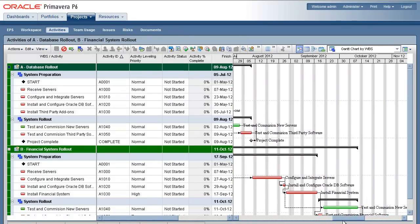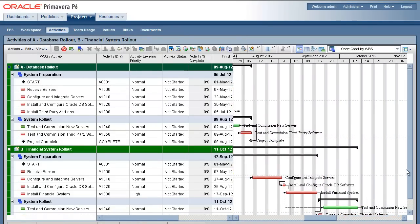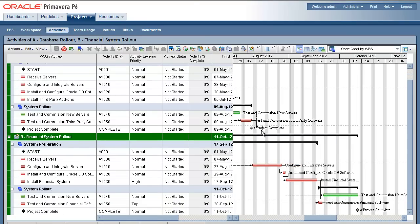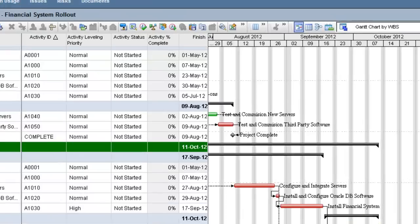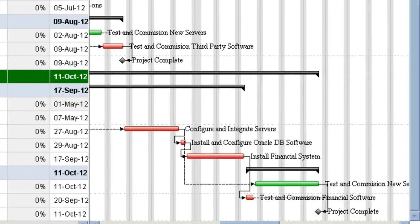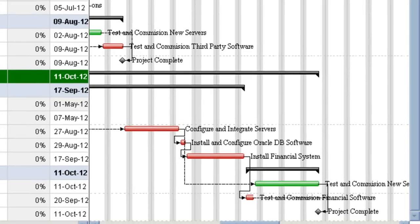Due to the resource demand both within the projects themselves and from other projects, it is clear that these two projects cannot run in parallel as was first scheduled. Project A will now finish in early August rather than in early July and Project B will now finish in mid-October rather than in mid-June.